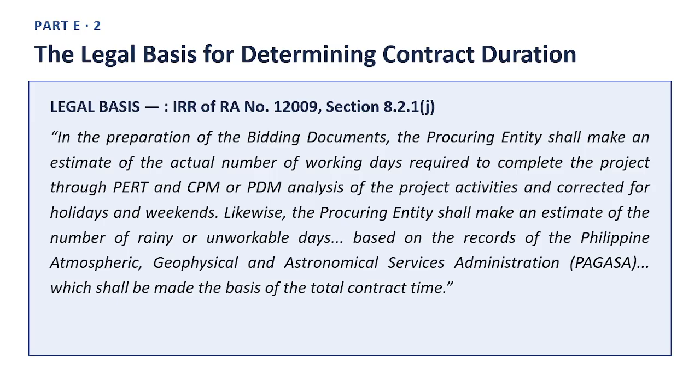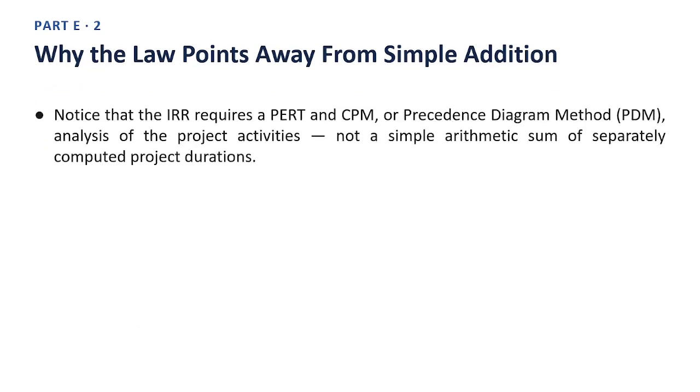Hold on to this citation, because it is the legal foundation for everything explained in the rest of this section on clustered projects. The law does not say add up the durations, it says build a proper schedule network and find the true critical path. Next slide. Why the law points away from simple addition.